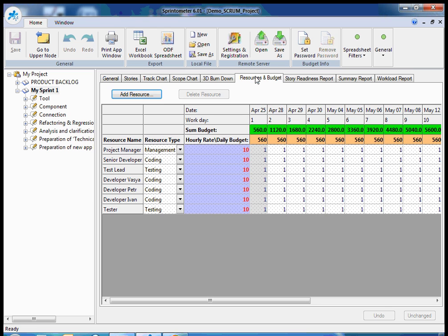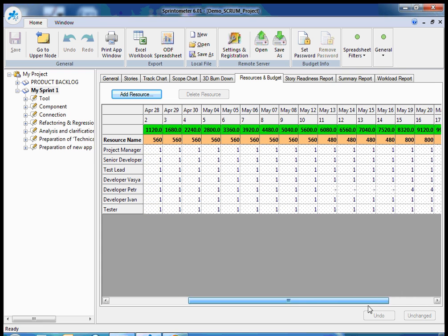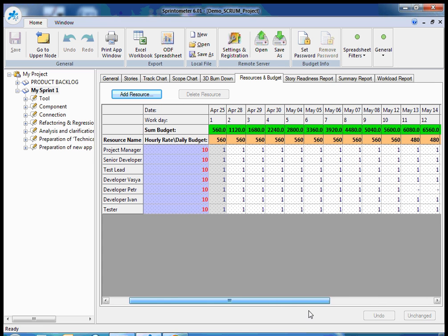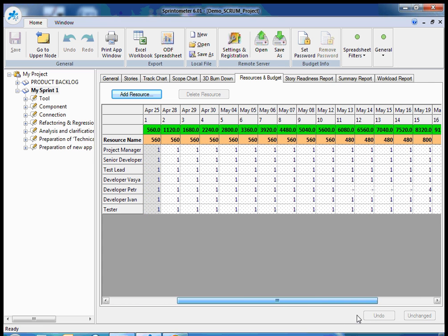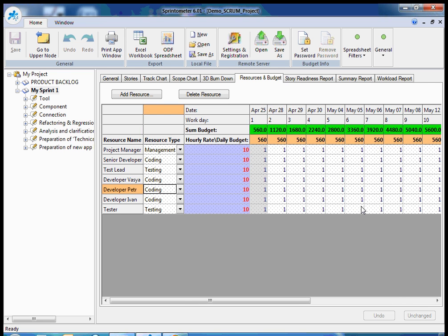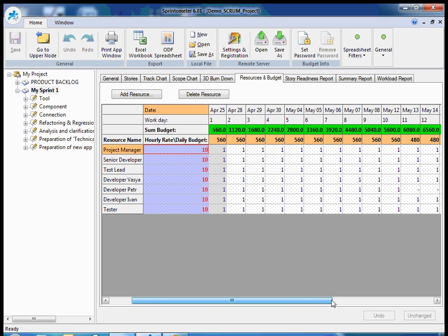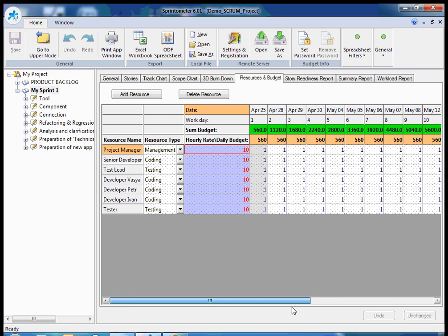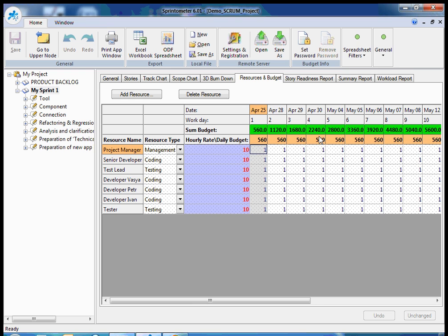In resources and budget, I can add people here and provide a schedule of my resources. For example, if some person will go on vacation, I will set empty values, zero values here. One means full day, eight hours. And here I can provide rates if I need to calculate sprint budget and project budget.